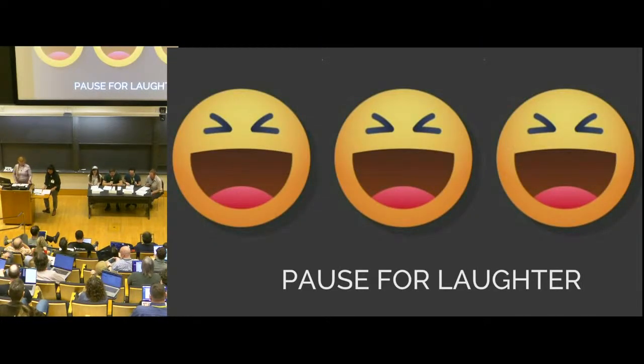That is gonna have to wait. That is in the not critical for launch column. I'll document it as a ticket in the would be nice post-launch epic so that your request is not forgotten. The team nods and gets to work.